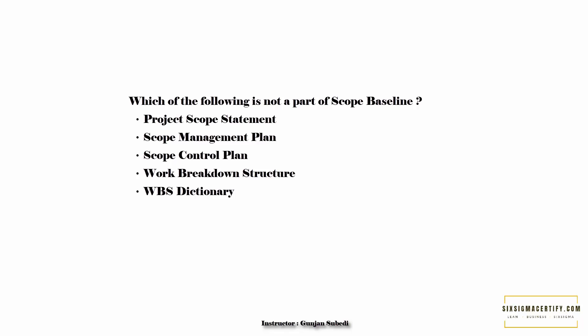The options are: project scope statement, scope management plan, scope control plan, work breakdown structure, and WBS dictionary. The answers are scope management plan and scope control plan — these are not part of scope baseline.